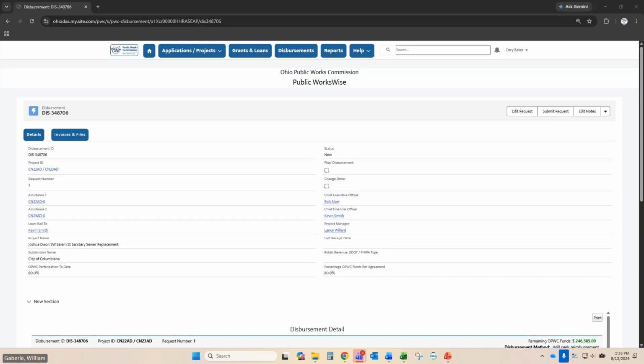You've got another question here about the use of contingencies, and can they use contingency funds for a bid that is over the application amount? Contingency, if it's over the application amount, no. That would simply go into your construction. But again, if you have that contingency money and it doesn't get used on something that is an unexpected cost, that can flow into your construction. But you want to list it in the construction line. You can't list it in the construction contingencies if it's an unexpected cost for something, again, like running into an underground line, or something along those lines. Again, if you ever have a question with whatever the cost might be, get with your program rep and discuss that with them.